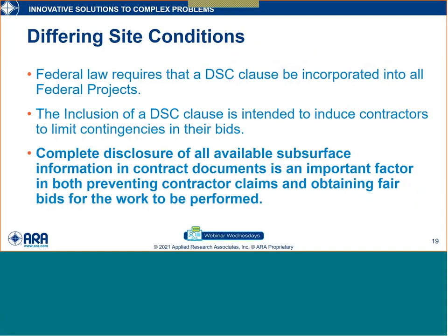First of all, you should be fully aware as a geotechnical specialist of the regulations and the legislation associated with differing site conditions. I don't have time, although we could take a deep dive into differing site conditions, type 1s, type 2, give you guidance in terms of how to proceed. But the bolded section here is highlighting that full disclosure of all factual information in contracting documents is imperative. That's a must. That's fundamental. But yet, often in disputes, we will find out that full disclosure has not occurred.